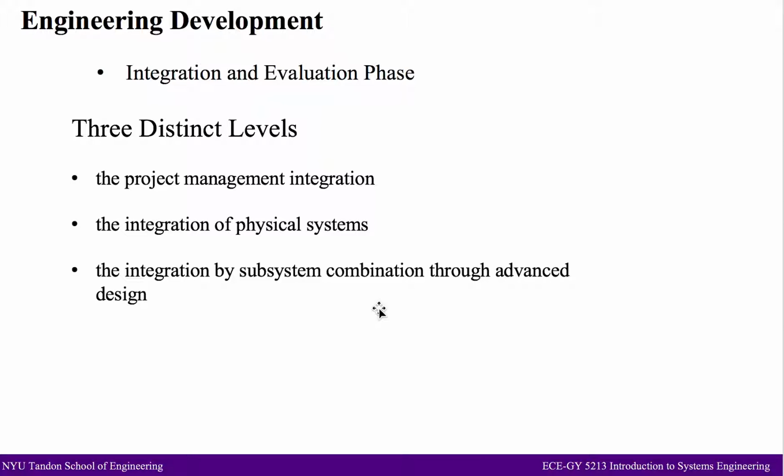After all of its subsystems have been produced, they are assigned to the mechanical group for installation. The assembly is then transferred to the electronic integration group, where the electronic integration process follows the prepared flow chart, which is related to the most effective manner of checking out the subsystems one at a time. The mechanical group is on standby during the electronic integration, with no integration duties to perform other than those related to the installation of the electrical interconnection system.